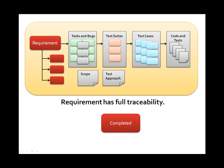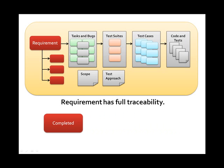The result of the previous effort leads to full requirements traceability, from the requirement to its split sub-requirements, to the tasks and bugs that complete the requirement, to the source code that constructs the system, and to the tests that validate whether the requirement meets customer specifications.